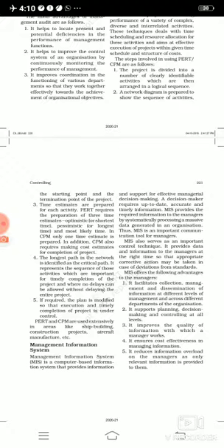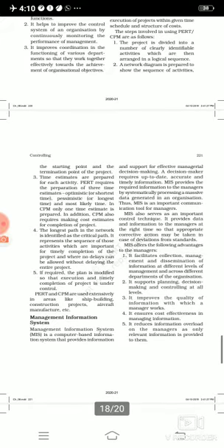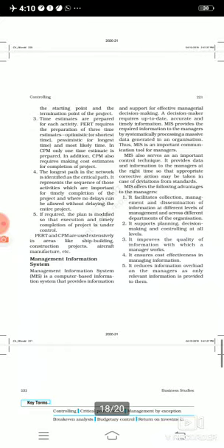Next, a network diagram is prepared to show the sequence of activities. Once you have divided the activities into a sequence, after that you have to make a diagram to see the sequencing. Third, we have to estimate the time. Time estimates are prepared for each activity, meaning for every activity we need to know within which particular period of time this activity is supposed to be finished.